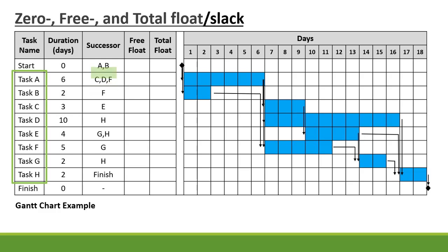The successor activities of the start milestone are Task A and Task B. Task A is connected to C, D, and F in a finish-to-start relationship. Task B is connected to F. Task C is connected to E. Task D is connected to H. Task E is connected to G and H. Task F is connected to G. Task G is connected to H. And Task H is connected to the finish milestone.